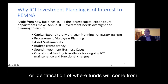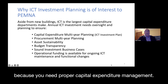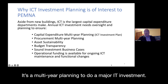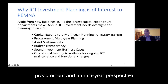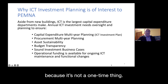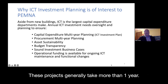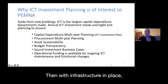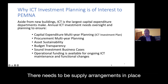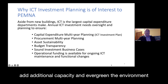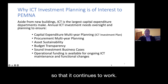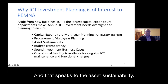Proper capital expenditure management requires multi-year planning for a major IT investment. You also have to think about procurement from a multi-year perspective because these projects generally take more than one year. With infrastructure in place, everything has a life cycle — supply arrangements need to be in place for multiple years to sustain the infrastructure, add additional capacity, and evergreen the environment so it continues to work. That speaks to asset sustainability.